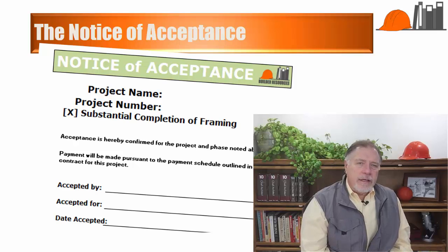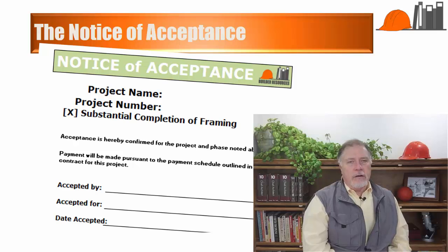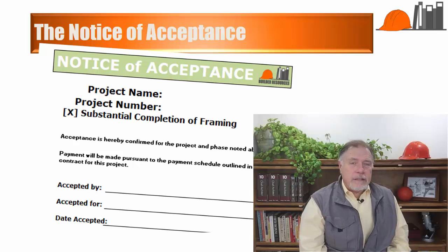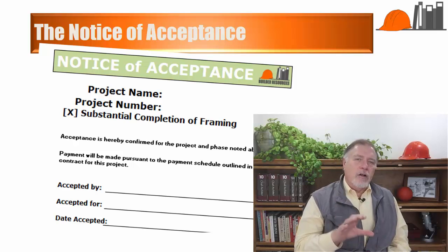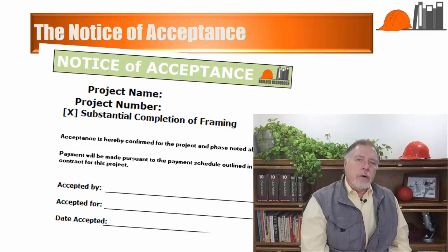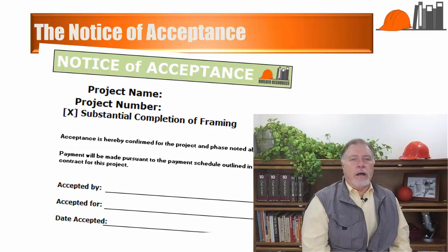Importantly, the notice of acceptance sets the stage for the draw request. If the buyer accepts the milestone as complete, she should have no hesitation paying the milestone draw as outlined in the contract. If she balks at signing the notice of acceptance, then a problem exists and can be dealt with immediately. You are not put in the position of having to deal with a complaint about the framing or installation when the entire budget and more has been spent just before the final walkthrough.